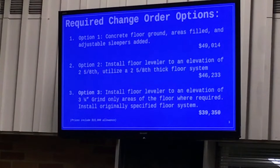So, of the options that we are presenting to you, this is the one that is preventing us from moving forward at this time. As we look at some of the consequences of delaying, right now we are putting ourselves about 4 weeks behind, and where that may come into play is with some of the scheduling that we've done for January 20th, as well as where we can store the bleachers as they're planning to deliver them.